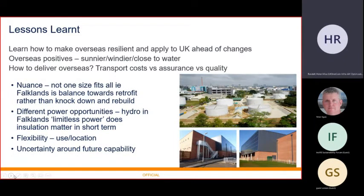We've also said that we've got uncertainty around not only the climate but capability requirements. So we need to increase resilience and flexibility of our own requirements and designs when we're planning for potential developments. An example of this is the work that's currently being done around Oman and how that could develop. We need to understand at a very high level the master planning: where is the most appropriate place to put things? Can we start putting in support infrastructure early, so that we can take advantage as and when funds come through and build buildings in the right orientation? We've looked at how the wind that comes through will impact what we can gain from solar shading, what we can gain from cooling, and what's the most appropriate place to start building.